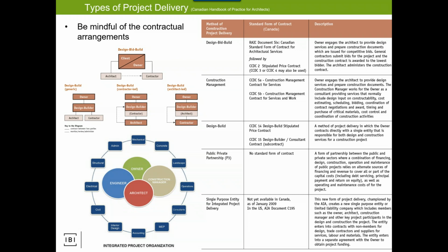And I've seen this, the same would go for ducting as well, usually for pipes as well. The engineer will design the intent, what the joints should be, and then there's a fabricator that will actually take professional responsibility that, once the pipe is built and we know what's going through and we know the nature of the material, the type of the pipe support, they'll professionally seal it, that it will not fail due to the prescribed flows.